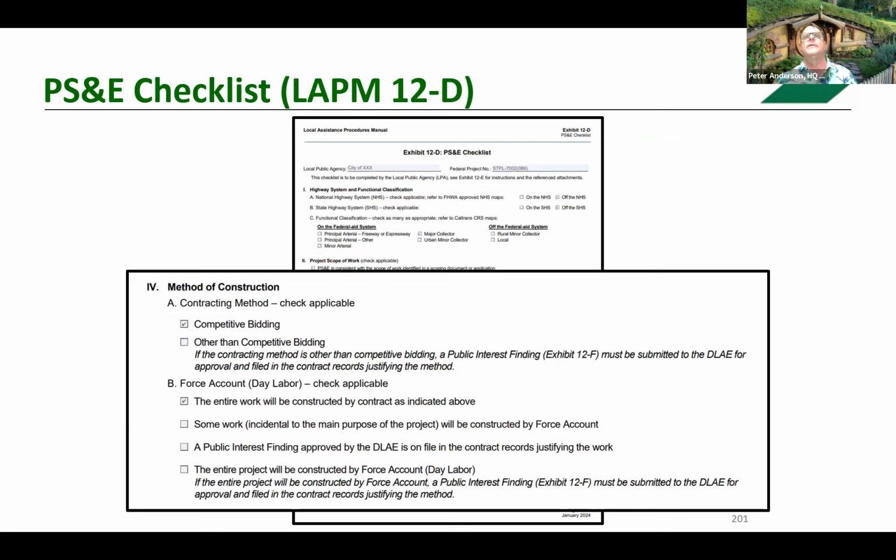by local agencies. I had an agency that I dealt with in the Bay Area. They used their own workforces to do striping. So if there was a pavement project, they brought their own forces in to do the final striping. And again, it has to be justified each time.